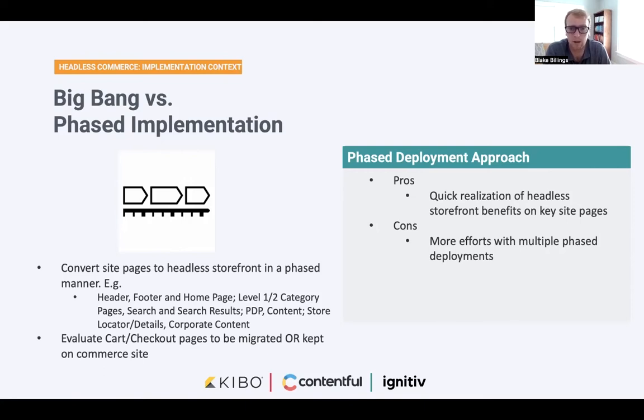So to the point, Deepak, that you were making, if you could change the homepage and marketing landing pages first, if that's where you can get the most value, why wait 9 months to try to get the full value if you could get partial value in 2 months and a little bit more in 2 months and a little bit more in 2 months, right? And I think we can all relate that a giant 9-month project has a much higher chance of things slipping or just not happening than 5 smaller 2-month projects. That doesn't have to come to software implementations for us to relate to that.